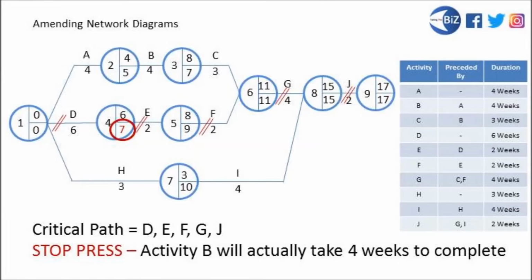And we're changing these activities, and because we're adding a week to their latest finish times, we're taking them off the critical path in essence. If we go to the bottom here, our critical path, we've got down as D, E, F. But that's not accurate anymore.